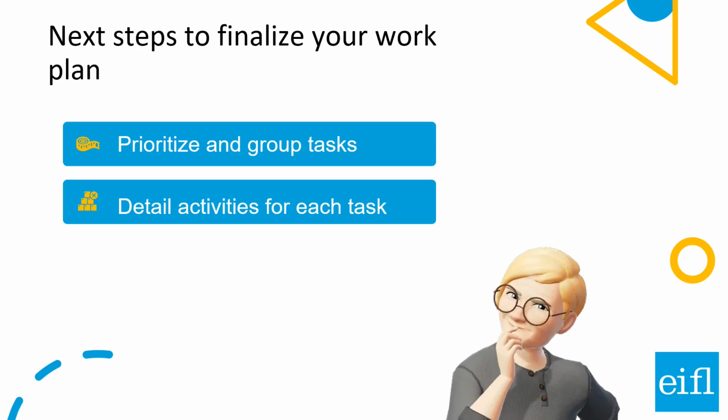For example, to organize the training for library staff and ICT teachers, you'll need to develop a curriculum and engage experienced trainers, prepare template educational plans for the mobile classes. For purchasing equipment, you may need to prepare detailed specifications, choose the public procurement method, identify potential suppliers, and so on.